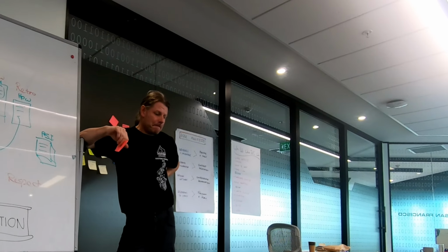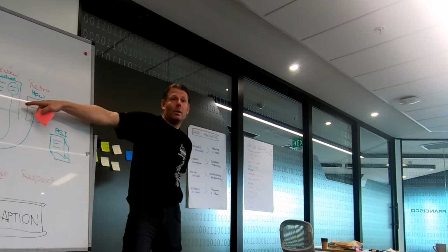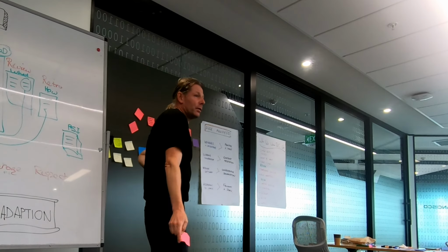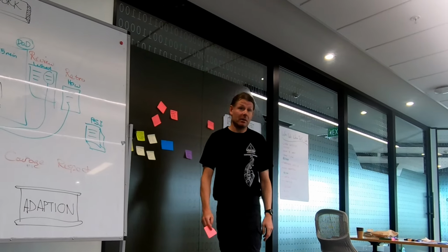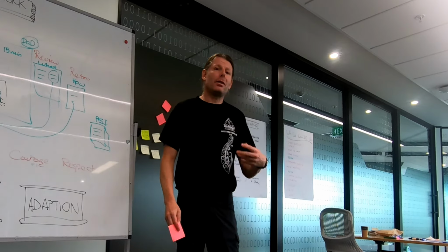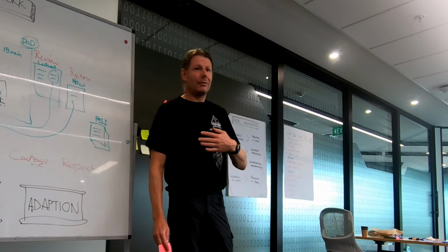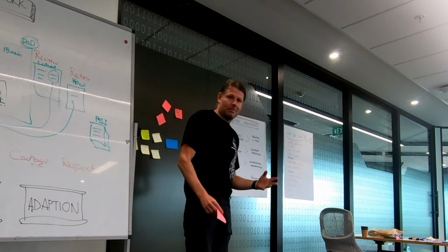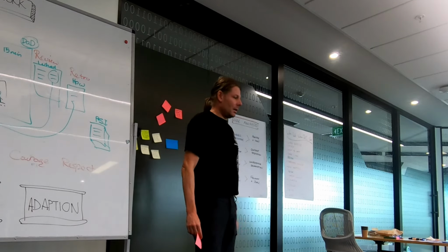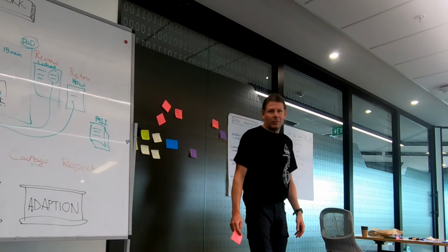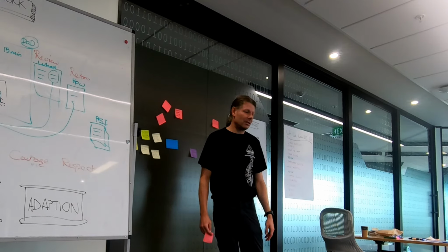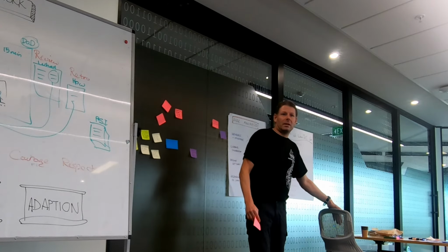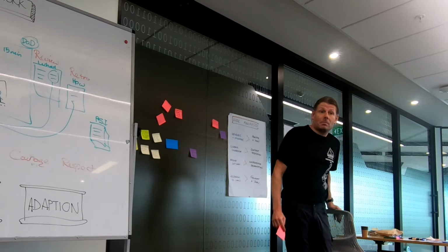Yeah, we do. The events in Scrum, if you actually tally it up, it's about 12.5% of your time. Add up to 10% for refinements, that's 25%. Now the theory goes that everything else is time for the team. Yep. But we know we have a lot of other stuff, like QBRs here and there, and then all these other meetings. I would encourage us to really radically challenge all of the meetings.